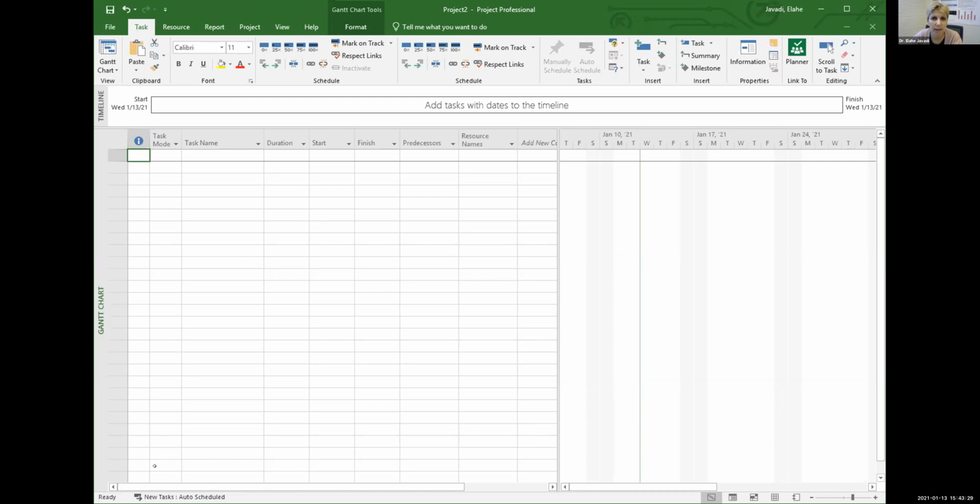It tells you that if something changes about a given task, all related tasks will be updated accordingly. This is a nice feature, and in most cases, you want to have this feature on auto schedule. So an example, like if a project is ahead or behind and you add or remove days, it will shift everything after that. Exactly. For you? Absolutely. Okay. Automatically changes the start time, end time of everything that depends on it.